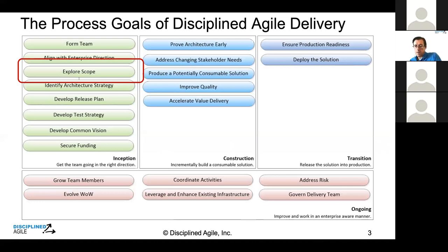And it's a classic problem we see in organizations, that they don't have any mechanism for prioritizing their technical debt, their technical work, alongside the value work, so it never gets done. Or it gets done by development teams subversively, just because they know it needs to be fixed, and they know it's too much hassle to get the business to prioritize the refactoring. And then, of course, that violates the principle of no hidden work, deadlines slip, bad things happen.